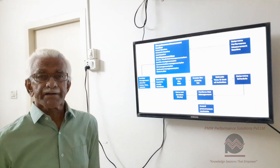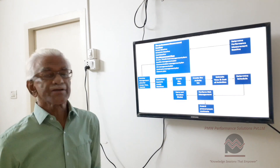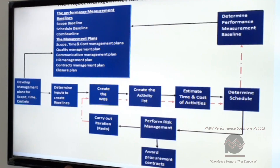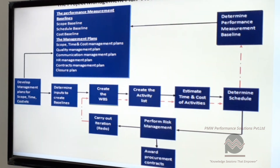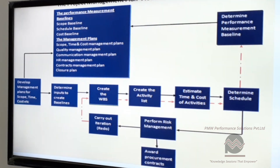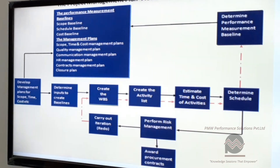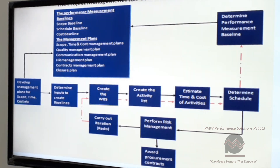Here, what we're saying is the schedule and the entire project management plan, which is shown here, goes through an iterative process. After the risk management process is performed, the entire plan is iterated — maybe once, maybe twice. You can see the red line here, that is the iterated process path.